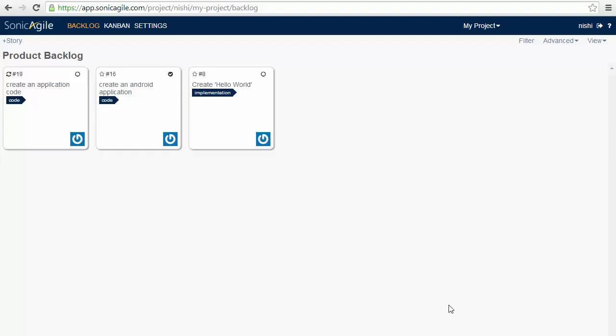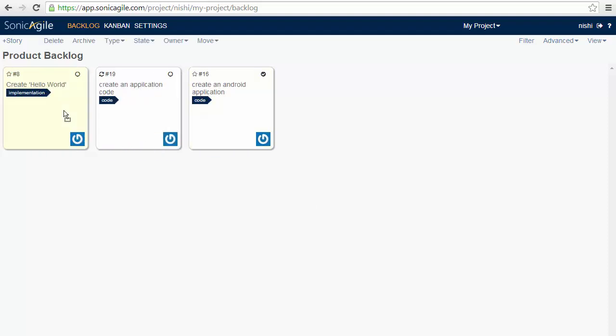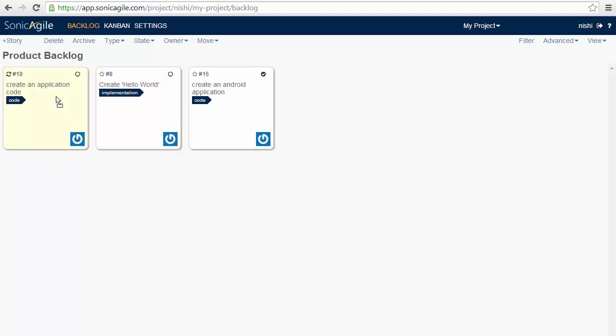SonicAgile makes it easy to rearrange the stories in our backlog. We can drag any story in our backlog from one location to another according to the priorities. So in this way, we can list the most important work at the top of the backlog and the least important work at the bottom.